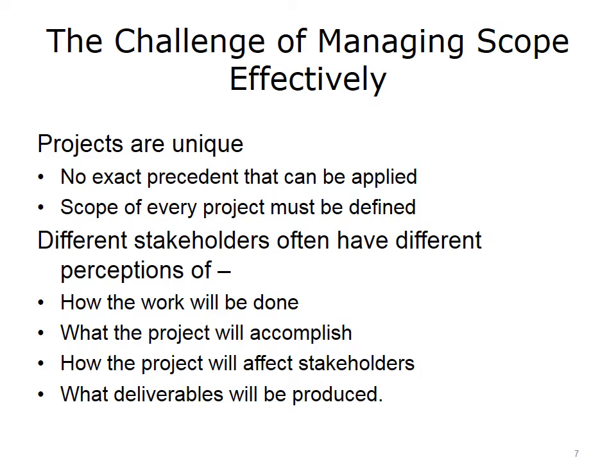To be successful as a project manager, you'll want to really tease out all the wants and needs at the start of the project and make them visible. Being aware of them can be instrumental in ensuring a successful project. The challenge of managing scope can be subtle, but it's very important and needs to be recognized as a significant challenge. You will always need to have the original scope statement and statement of requirements on hand to reinforce the current parameters and consider changes only in an explicit way.